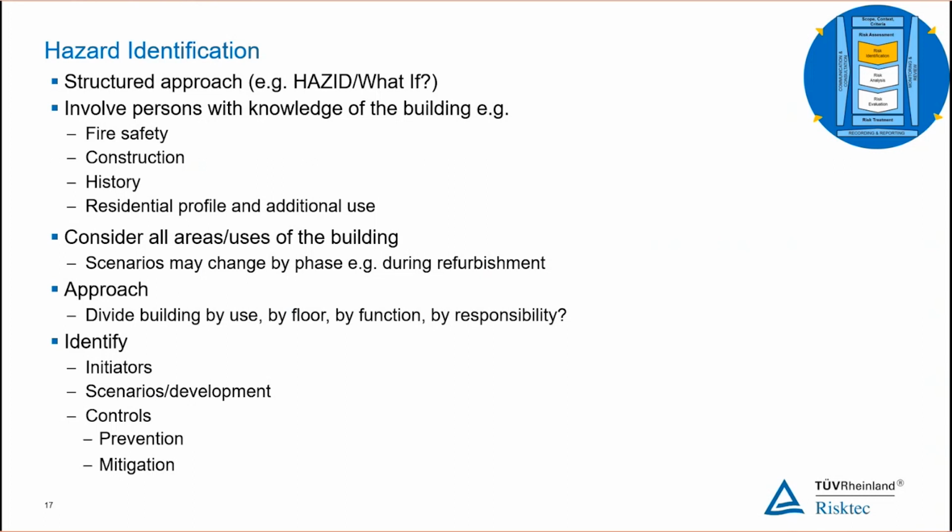I've mentioned these two tools, hazard and bow ties. We can use each by themselves. We can use both of them as a collaborative approach, and use a hazard to identify the risks, the hazards, and the bow ties to allow us to identify the controls. Equally, you might choose to manage the controls, or discuss the controls, within the hazard. Both work. It's what works best for you.